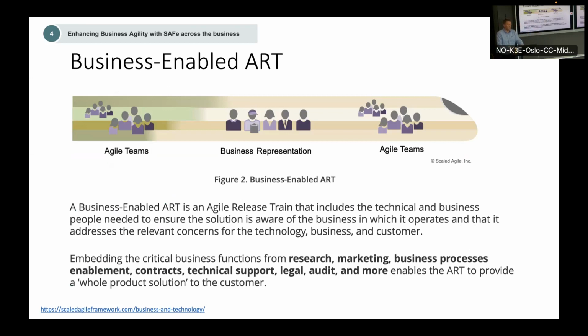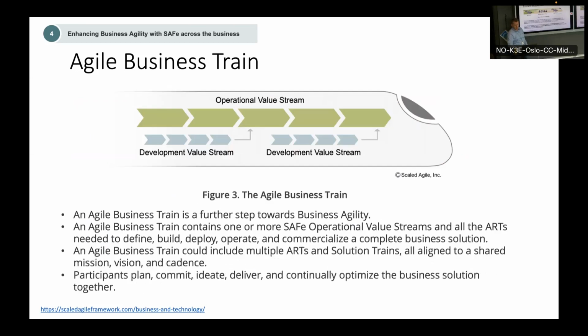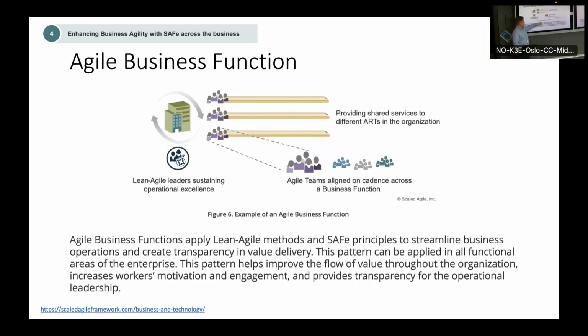Does that mean that they are dedicated to one train only? Mainly. I guess that would be hard, but maybe some of these are dedicated 50% of their time to this train. And if that doesn't work, maybe you could use this pattern and say that for the procurement team you have a point of contact, but they will have a backlog, and when requirements come, they will be flexible to support at a certain time. But they then need to be agile teams and maybe have a Kanban board and plan and get high priority work which comes from this team. So it's about how you then adapt.